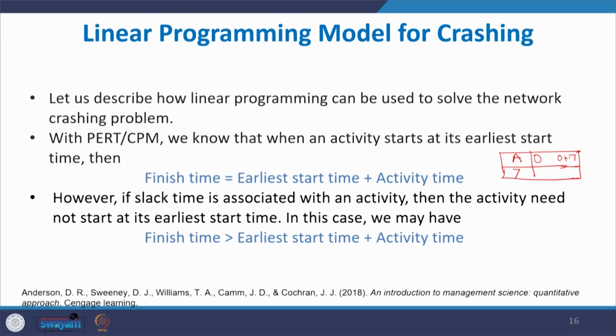However, if slack time is associated with an activity, what is the slack time? Sometimes instead of starting at the 0th day, we can start on the first day or second day if slack is available. If the slack time is associated with an activity, then the activity need not start at its earliest start time. So the finish time may be greater than the earliest starting time plus activity time.